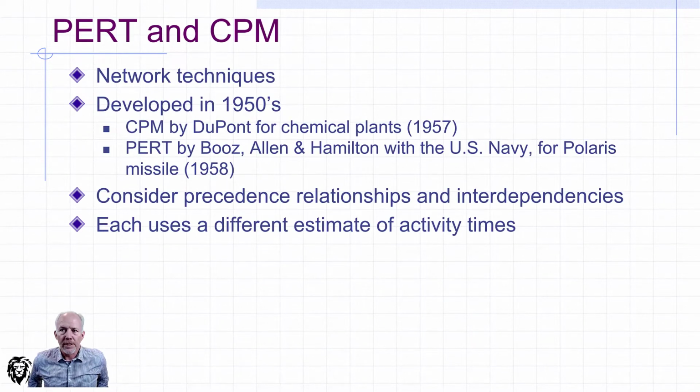So what about PERT and CPM? They're both network techniques. CPM is a network technique, and we're going to look at it to determine what our critical activities are. And PERT is also a network technique at the full extension, but is first applied at each of the activities individually in order to be able to do that. So we saw back in the introductory lecture that they were both developed around the same time back in the 1950s. And while done in isolation, they really do come together nicely. And so we will teach them in isolation, but think of them and demonstrate them in their integration.